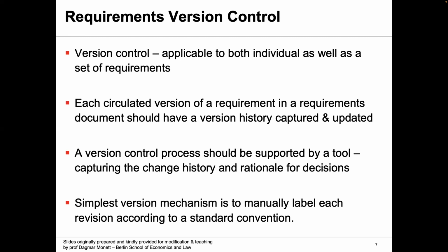So this is how you're going to maintain the same simplicity of requirements management here as well. What you're doing is just incrementing the draft number with each iteration until that document is approved, and then it is baselined.